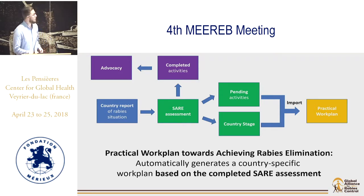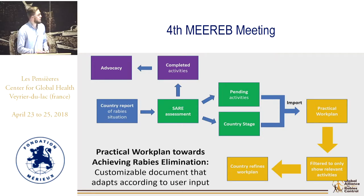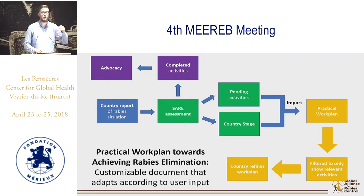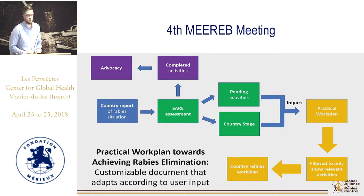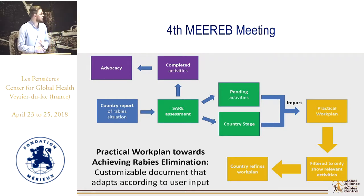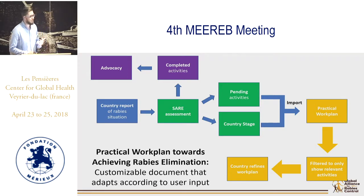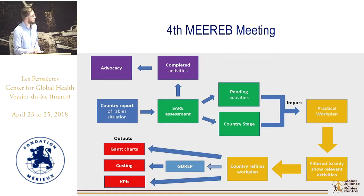What we have done is develop an action plan for every single activity in the SAY assessment. Every activity has a list of objectives, key KPIs, a timeframe indication, and once you have done your SAY assessment, this work plan adapts to only show you the work plan for your pending activities. The system looks at your SAY assessment, identifies what is missing in your country, and provides a work plan that is unique to your situation.